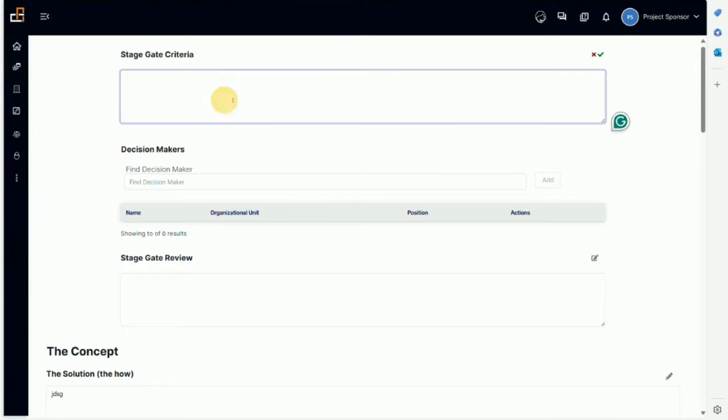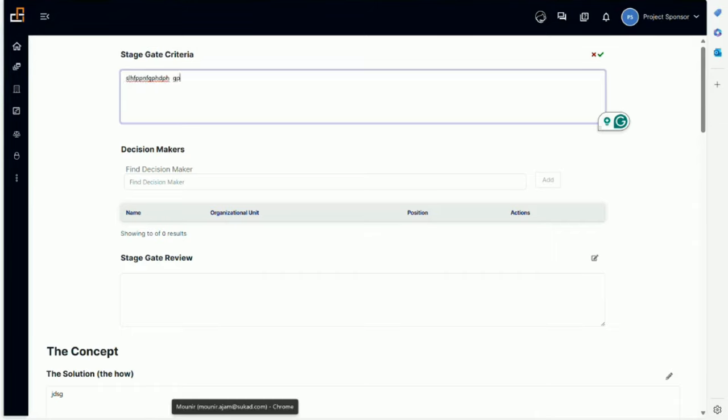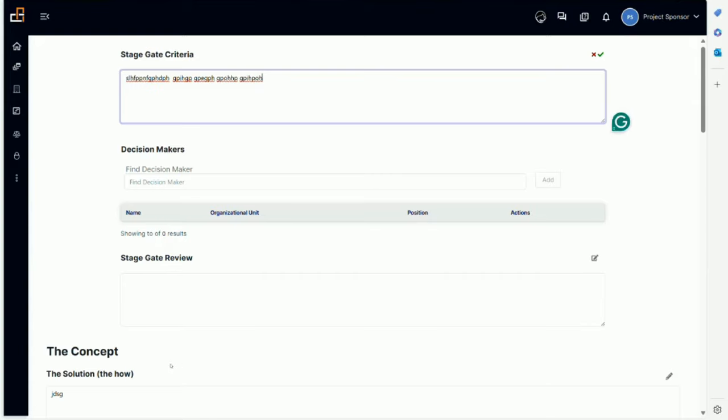They would have criteria that would appear here. If there's nothing, that means we did not enter the criteria. In this case, the sponsor can enter information about what criteria he or she is using to approve the stage gate. Maybe for an organization that is learning and doesn't have this established, they can build it as they go. They can start to establish these, save that information, and ultimately create the criteria that all projects can use.